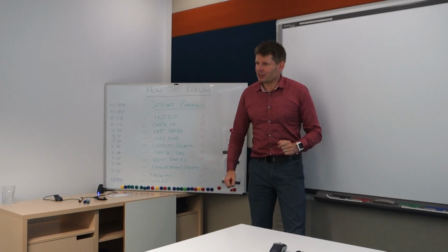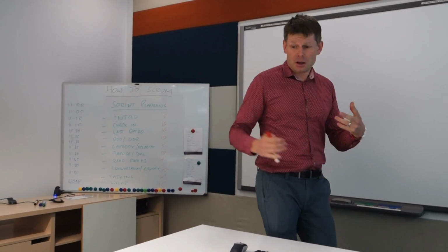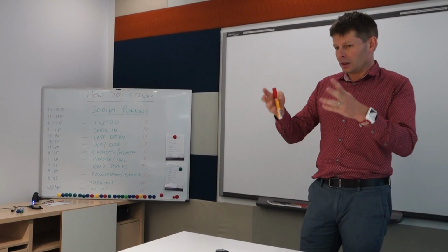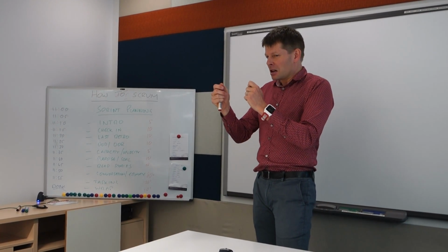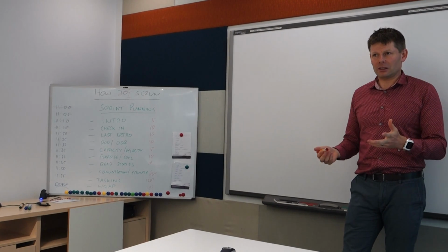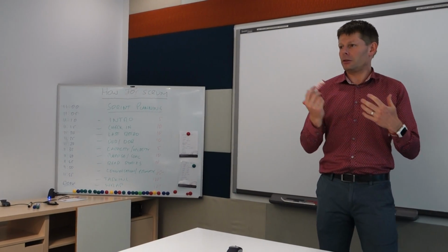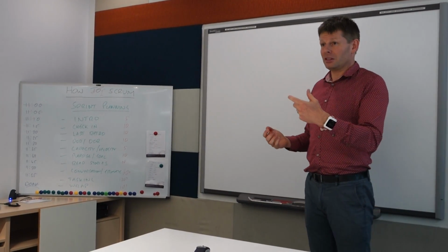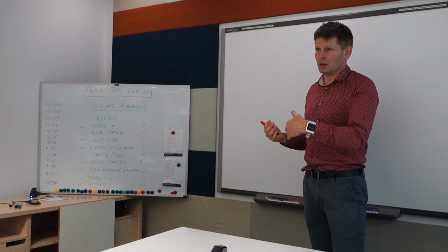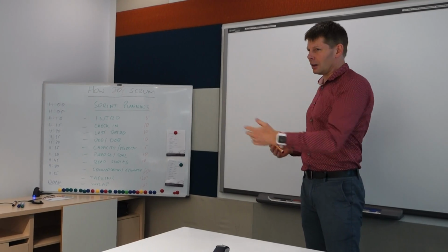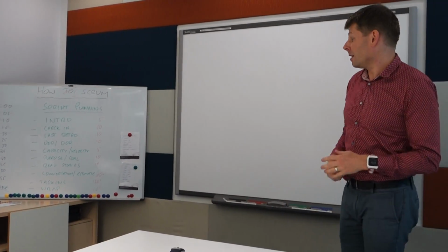Then the tasking is the how, and this is where the team will look at each user story and say, well, if that's what they want to do, I'm going to break it down into tasks, typically between half a day and 2 days long, so you can see the flow as they go through the sprint. And we break them into tasks, which even though it's a cross-functional team, there may be areas of specialty. So this is middleware, that's testing, this is development, and so forth, or documents.